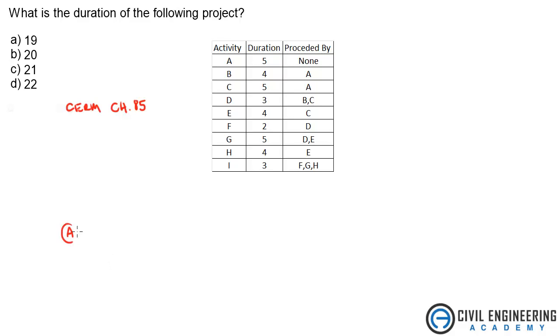So here's activity A and I'll write the activity and the duration above it. And so we know this duration is five days and nothing is preceded by it. If we go to B it says it is preceded by A. So we're going to go to B and draw something like this. Here's B. And C is preceded by A. So let's go to C.